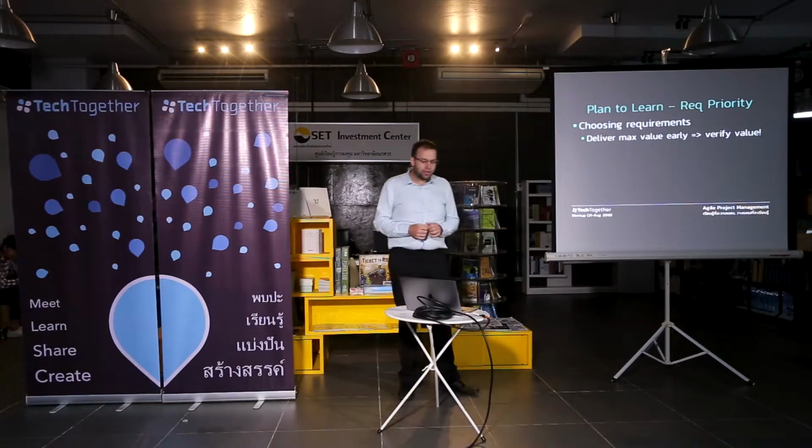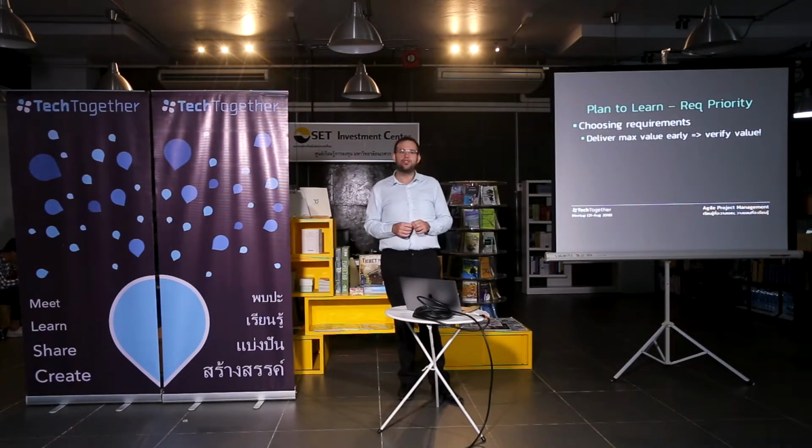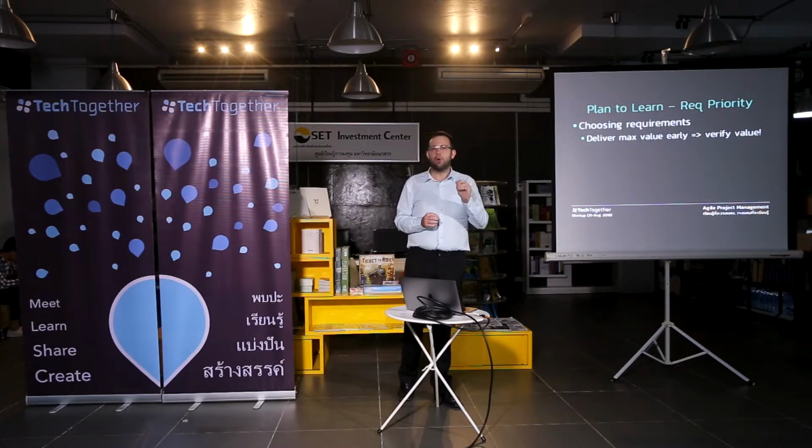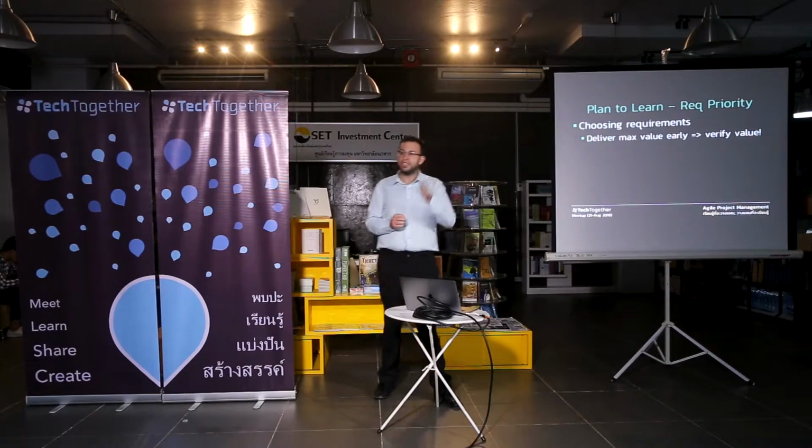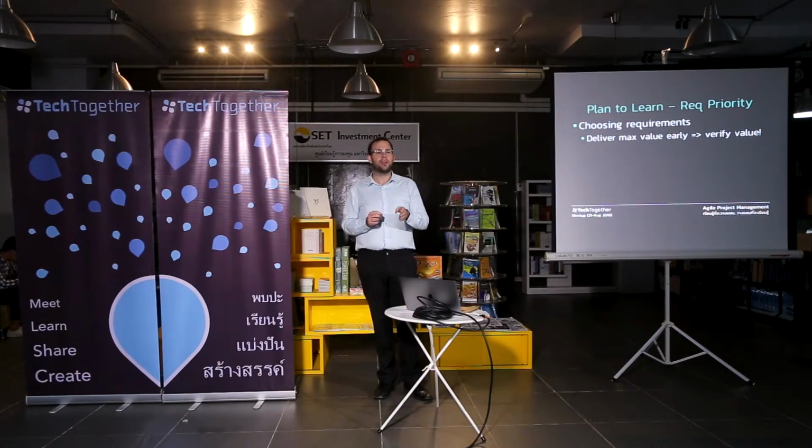So what do I mean? You have to be very careful to choose the features that are important, or that you think are important, and build them first, so you can test them first and make sure that you are correct. Because if you're not building those high value features till 3 months down the line, and then you find out, actually, we don't need these, actually, the market needs something else, those 3 months are wasted.